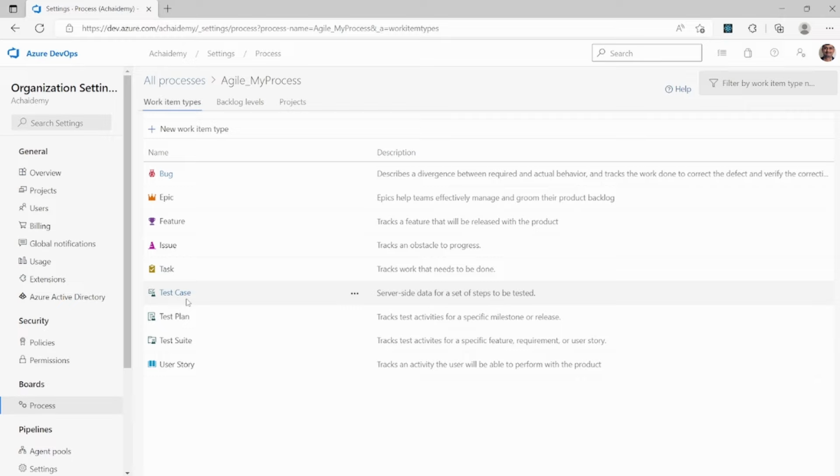Again, as I said, it could be load testing, penetration testing, security testing, or various other testing we do to validate not only the features but also their performance and security before they go into production. To track this, you could create a new work item type, then start creating the stories or work items of that type at the project level, assign them to the various team members, and track the time.